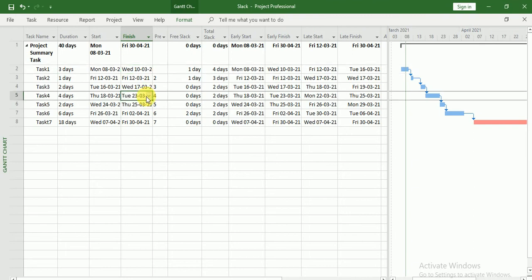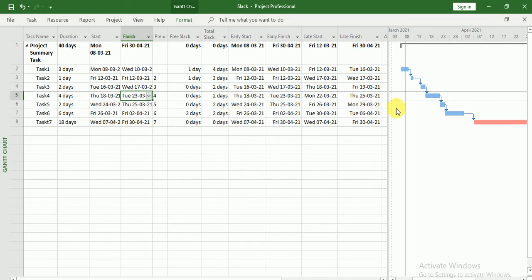This task I can delay only two days so that my project finish date should not be hampered. Let's do that — if I delay this task two days, that means Thursday 25th of March, then you will see all the tasks' total slack will be zero.